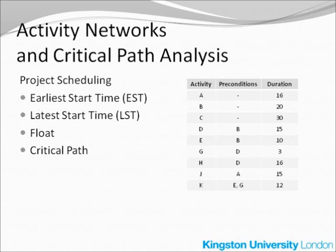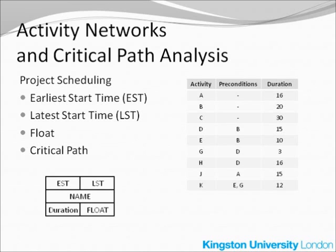One more piece of information in this table is the duration for each activity. This table will be used directly to create the activity network, in which every activity will be shown in the form of a node. This node is a bit complex. For every node, you put its name or label and four pieces of information: the duration in the lower left-hand corner, then going clockwise, EST — earliest start time, LST — latest start time, and finally float.